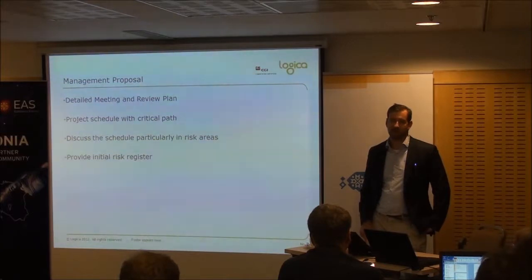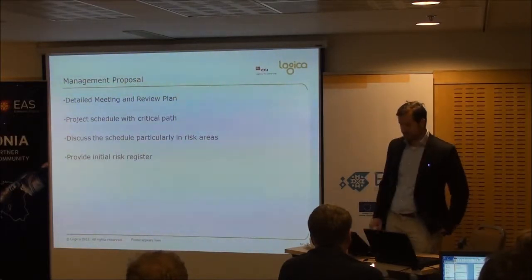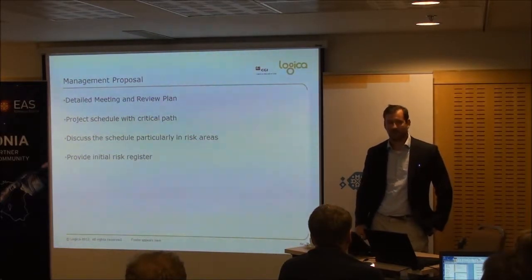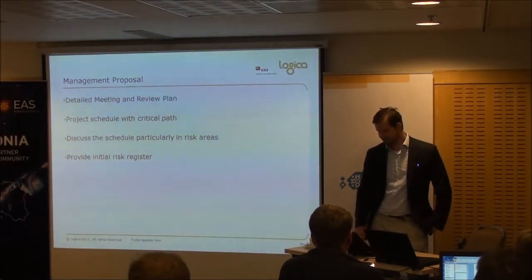Also provide an initial risk register. What are the key risks this project is likely to go under? How are you going to mitigate them, and anything else? You'll need to keep that throughout the project and keep evaluating, keep looking at it. So it will change, but they'll expect an initial plan.